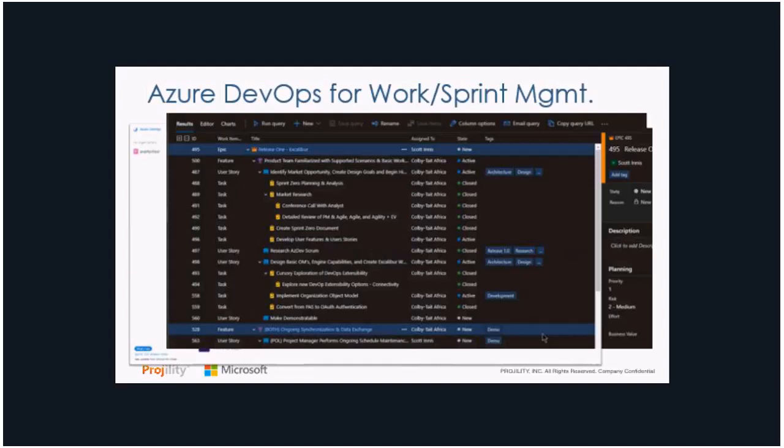I can open that window up and I can see all of the releases. Below the level of releases, I have products, which you can see in purple. Then I've got different user stories, which are in blue. And then I've got tasks, which I'm assigned, or different team members on the team are assigned. So I've got that hierarchy of epic, feature, user story, and task. And that's where I'm keeping my progress up to date as it relates to the detailed activities I'm working on.